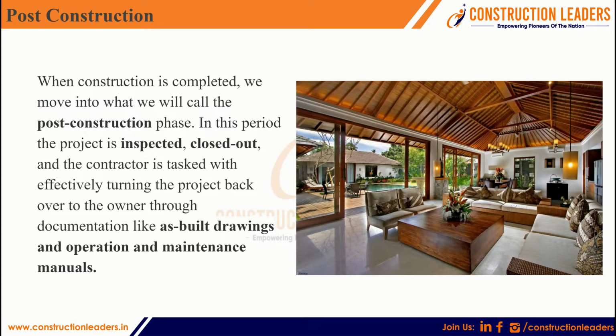They should get a proper amount of heating, ventilation, air conditioning and all. And we are also playing a very important role in bringing everything into the building. And what if something gets damaged inside the building and it needs repair? It comes under operations and maintenance. Yes, and often in this period the project is inspected and closed out, and the contractor is tasked with effectively turning the project back over to the owner through documentation like as-built drawings and operations and maintenance manuals.